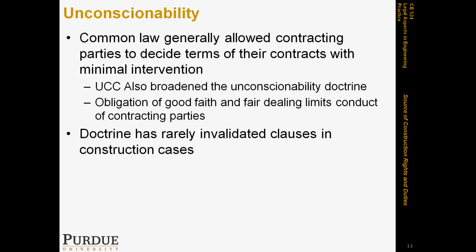The doctrine has rarely been used to invalidate clauses in construction cases. However, the possible cases where it would be applied are cases of exculpation or indemnification clauses. If you have an owner trying to get out of an important obligation by indemnifying themselves against the risks that ensue from this obligation, this could be considered unconscionable.